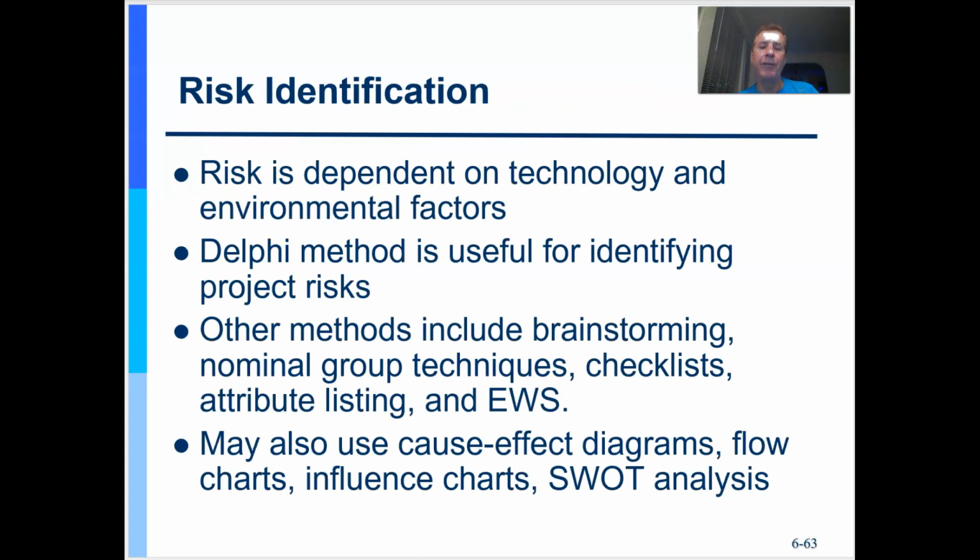Now in risk identification, there are lots of ways I can figure out risks. One is a SWOT analysis. That's usually a quad, doesn't have to be, that defines strengths, weaknesses, opportunities, and threats on your project. And of course, notice I said opportunities and threats, right? So a risk is an uncertainty, and it's both an opportunity and a threat.